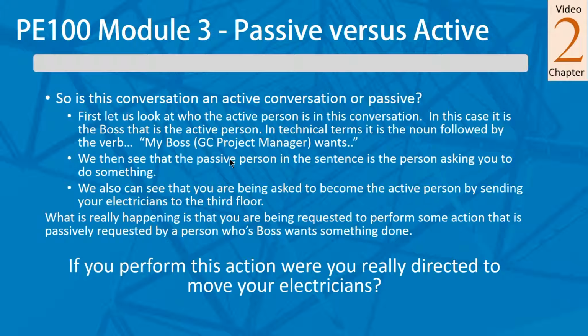And so let's move to the next issue when it comes to money or lost production. When this change costs you money or lost production, are you going to be able to collect for it just because somebody's boss wanted you to do it? That's a real question. I guess if that guy's boss is willing to stand up and say, "Yeah, I told my project engineer to do that," that's fine. But sometimes that doesn't happen. People get selective amnesia very quickly in the industry. And so all of a sudden that project engineer's hung out to dry, and you're hung out to dry really, because the engineer's still going to keep his job, but you're going to lose the money.